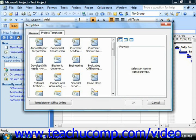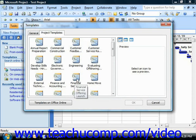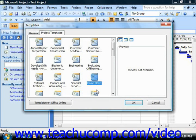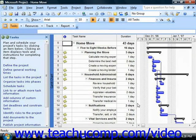To use a template, you would click the icon of the template that you wish to use as the basis for your new project from the choices shown in the Templates dialog box. Then just click the OK button in the lower right corner of this window in order to create a new project file based on the chosen template.